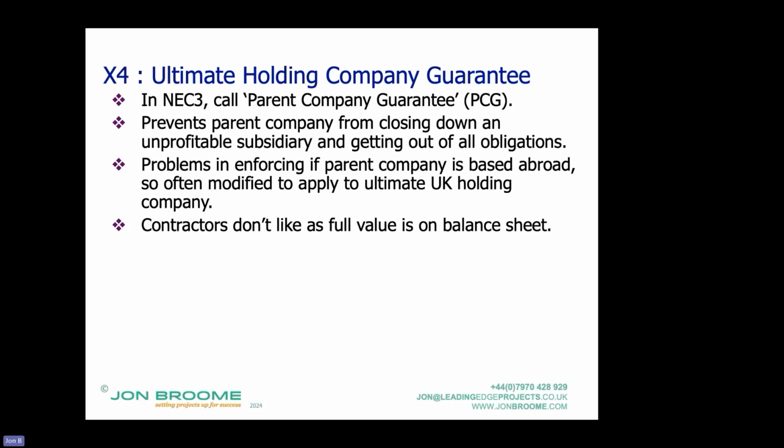So often it's modified or placed on the ultimate UK holding company, and if you're going to make a claim on it, you can actually get a court injunction to prevent assets being moved out of the UK to escape liability. The downside of this, from contractors, one reason why contractors don't like it is that the full value of it appears on their balance sheet.